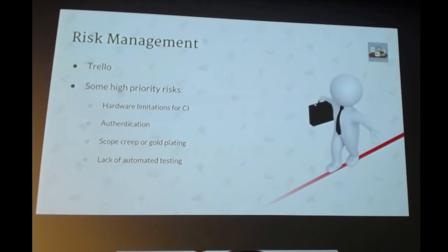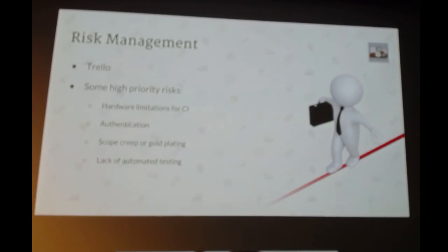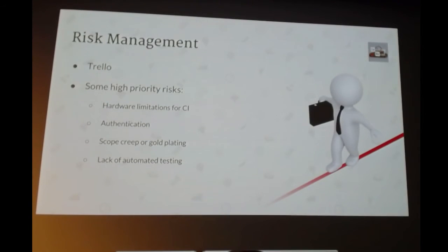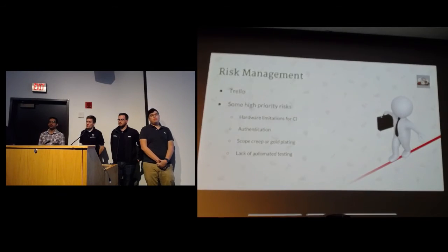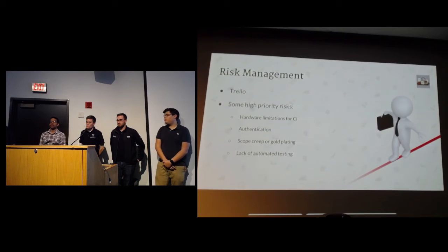I'm going to talk about risk management as it applies through our project. Early on, during the move to Jira, we needed to come to a decision as to what tool we wanted to use to do our risk management, and in the end, we decided on Trello because of its simplicity. We felt that Jira would have added an unnecessary amount of complexity to our task.